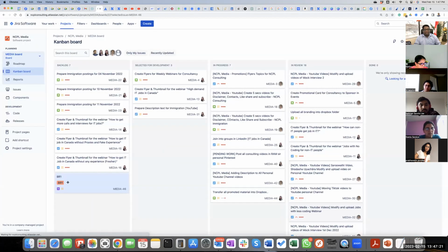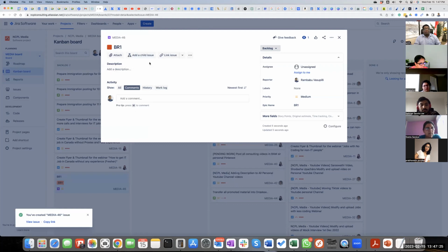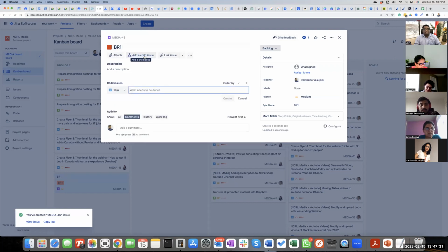So I created an epic. Now under this epic, what should we have? You have to add a child issue. What are the children? Children should be stories, the functional and non-functional requirements, right?